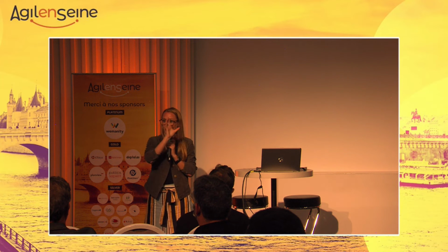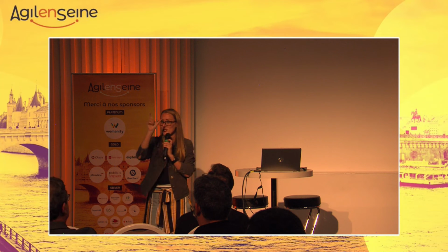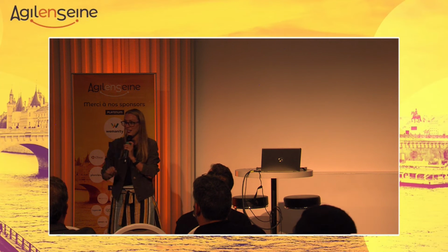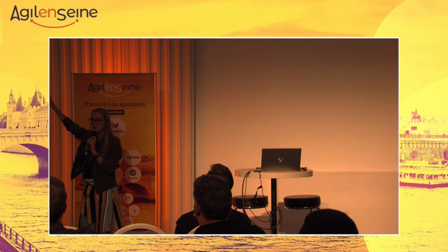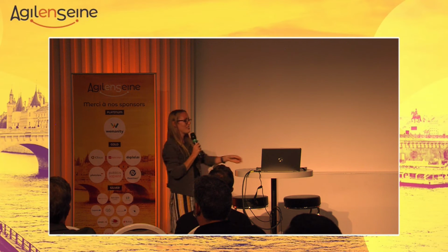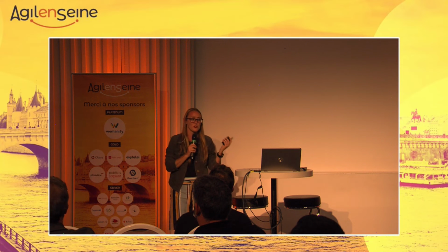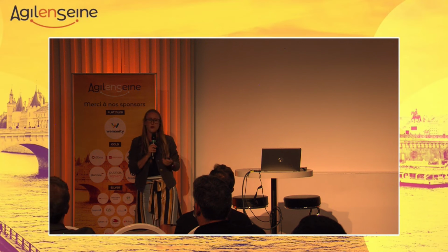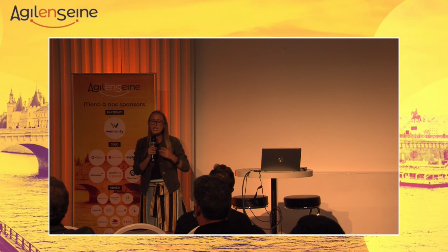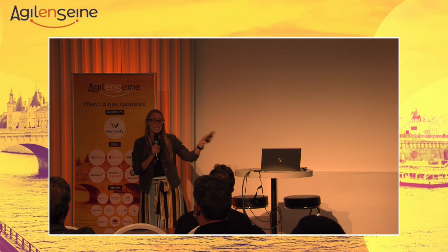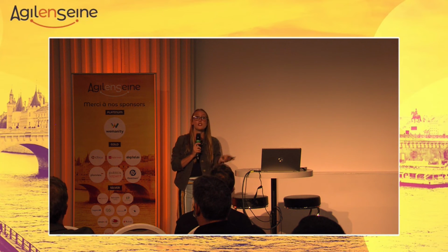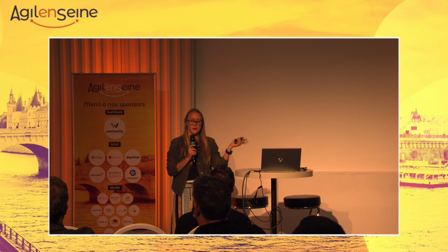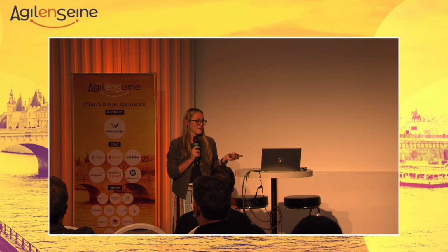We can clearly move one person from interviewed to offered to hired to onboarding. And I said, there's an agile tool for this. And so we implemented a Kanban board. We started actually doing daily stand-ups and started implementing these really simple agile tools, beginning with the outcome first. And we were able to reduce cycle time to 3 weeks. So we went from 3 months to 3 weeks.